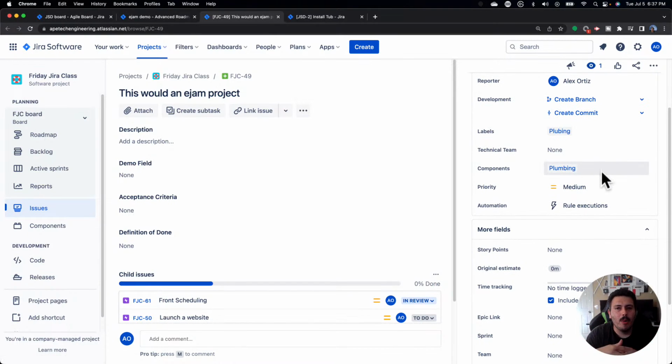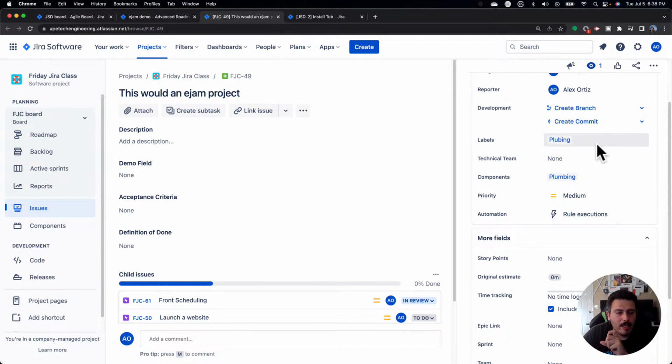So maybe at the component level, you can call out that project/initiative. Now, this can get a little tricky if you actually use components for what components are used for. But if you're not using components for that, that would be my next place. The next one after that would be at the labels level, right? So within the labels, I would create a label for each initiative or project, slap that label on the right epic, and then you can kind of go sort by that label.